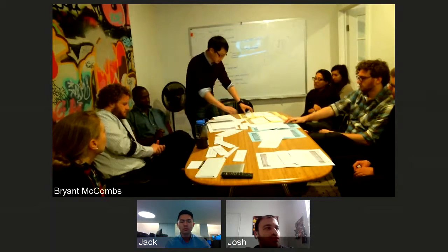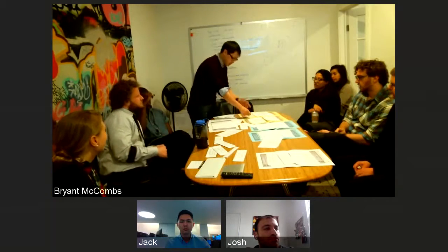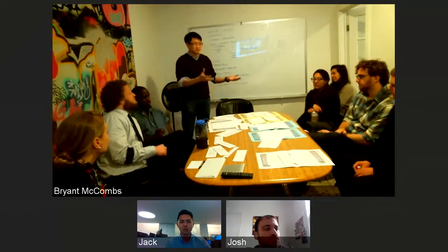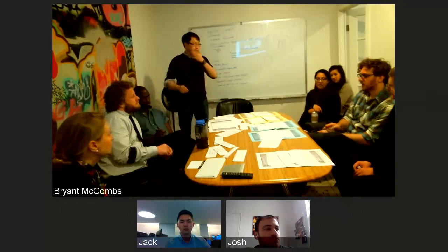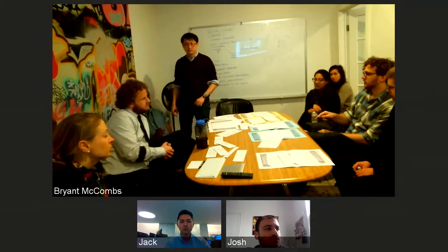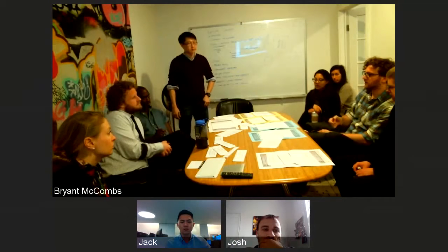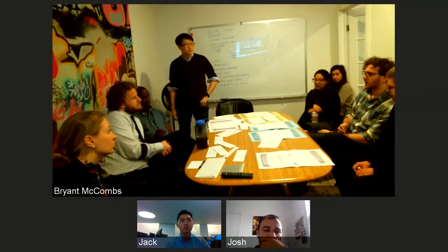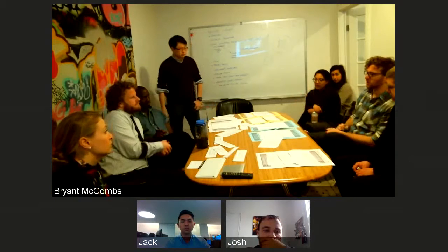It really is a block game in kindergarten, right? If it fits, it's in your budget. If it doesn't fit, it's out of your budget. I also really like the inability to introduce scope creep. With Pivotal, one of the problems I often have with clients is that I'm just going to add one design story, just a quick revision.